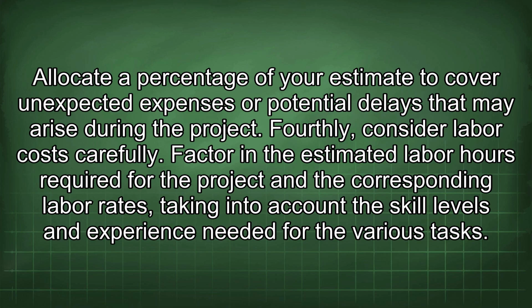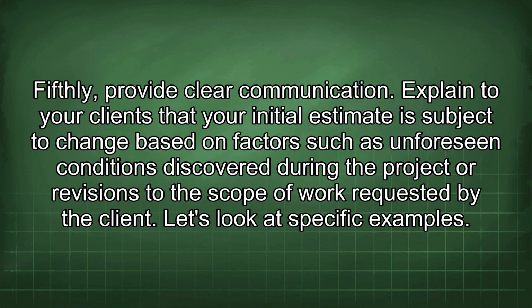Fourthly, consider labor costs carefully. Factor in the estimated labor hours required for the project and the corresponding labor rates, taking into account the skill levels and experience needed for the various tasks. Fifthly, provide clear communication. Explain to your clients that your initial estimate is subject to change based on factors such as unforeseen conditions discovered during the project or revisions to the scope of work requested by the client.